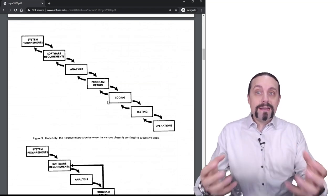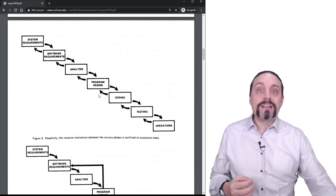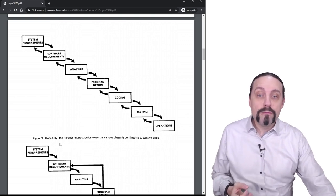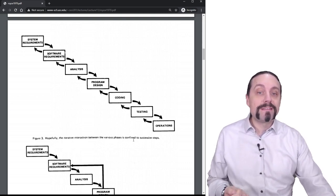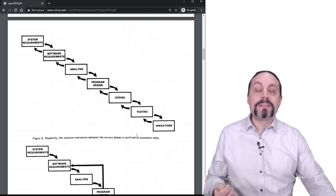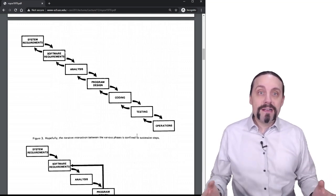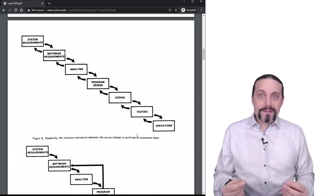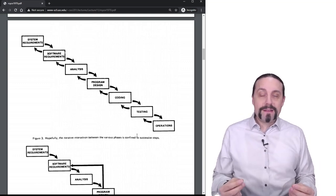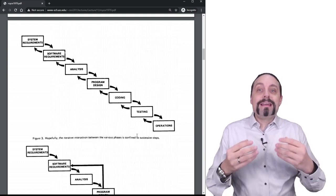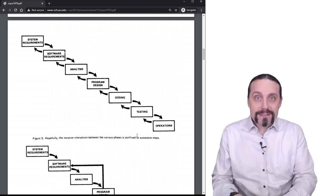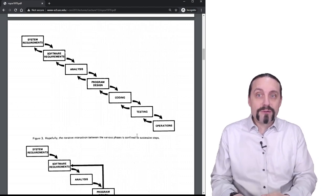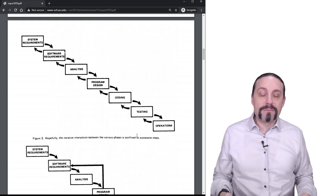But what is now really interesting when we scroll down to the next page. Winston is introducing an iterative approach and he also says hopefully the iterative interaction between the various phases is confined to successive steps, which is brilliant. So in the document from 1970 about the waterfall process it says that it is risky to use the waterfall process and you should use an iterative approach.